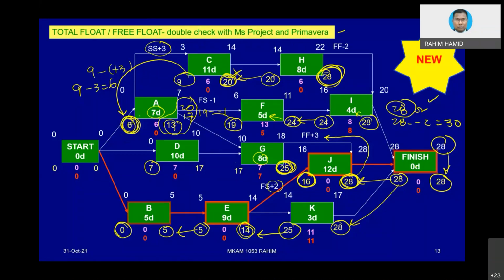At the end of the day, we have 6 here, 7 here, and 0 here, and the value that goes into the starting point should be the smallest value, 0. We start with 0 and we end up with 0. Okay, so that is the calculation.